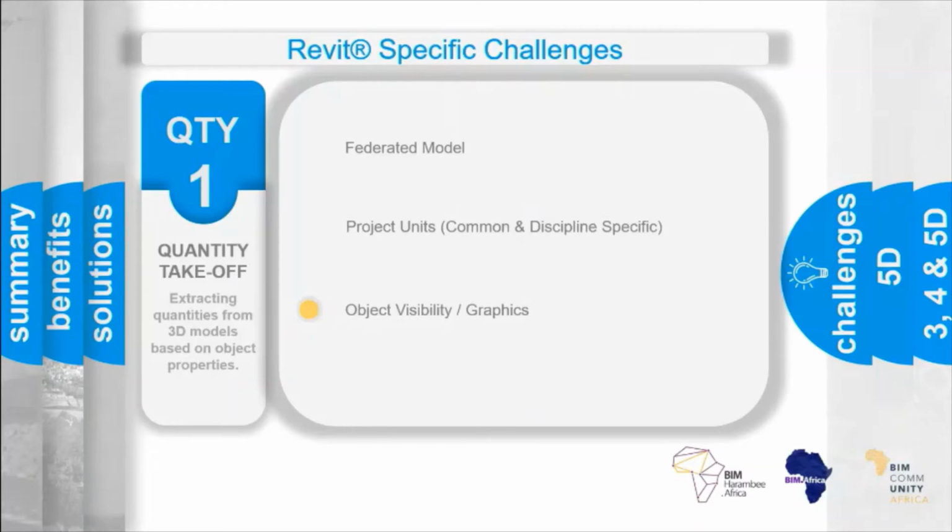But that said, the main role of a cost manager is to try and identify the missing spaces and fill in those gaps. At the end of the day, there is no LOD for a cost. The first cost you give is the cost that needs to be delivered. So it's an important role the cost manager plays in trying to envisage and make allowances for all of the final products.